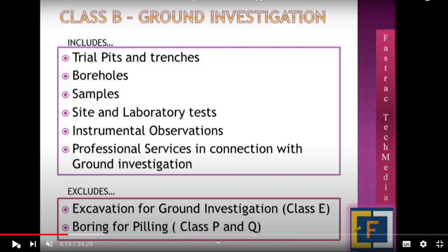Whenever we study CESMM, there will be a provision of what is included, what is not included. Here in class B, we can see it excludes excavation for ground investigation, boring for piling. So these two are also related to ground.